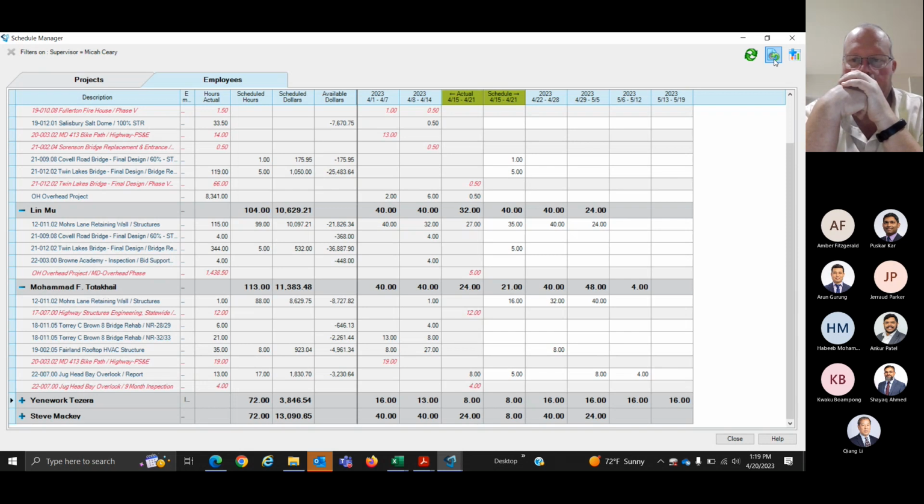I realize this is just made up numbers, but that's literally what I do, because I've had times where I've had someone at 60, and you're like, oh, we got a job starting that I planned on putting them on. Maybe that's not the best person to put on that job. They're still tied up in the previous job. And you can work on planning a little bit better in terms of start dates, et cetera.